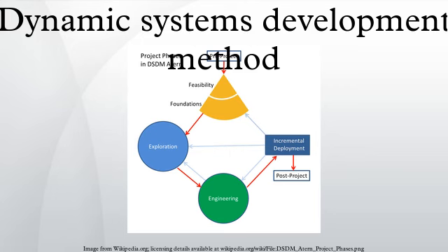4. Never compromise quality. Set the level of quality at the outset, ensure that quality does not become a variable, design, document and test appropriately, build in quality by constant review, test early and continuously. See test-driven development for comparison. 5. Build incrementally from firm foundations. Strive for early delivery of business benefit where possible, continually confirm the correct solution is being built, formally reassess priorities and ongoing project viability with each delivered increment.